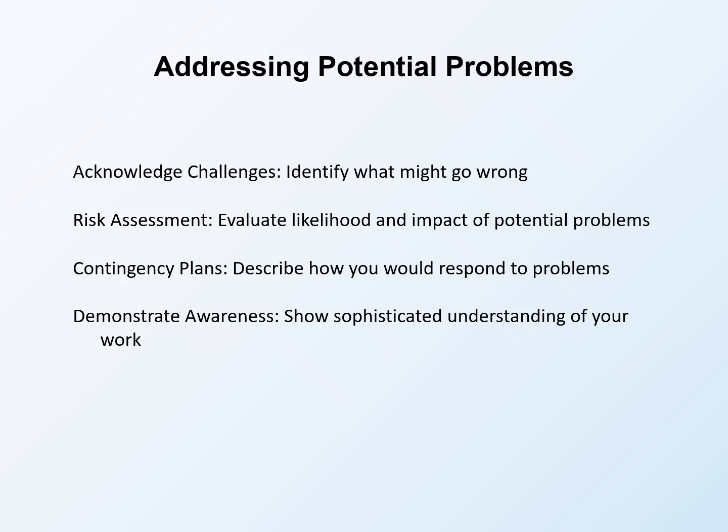Contingency plans describe how you would respond if problems occur. If recruitment is slow, what will you do? If a method fails, what is your backup? Specific contingency plans demonstrate you are prepared for realistic implementation challenges.